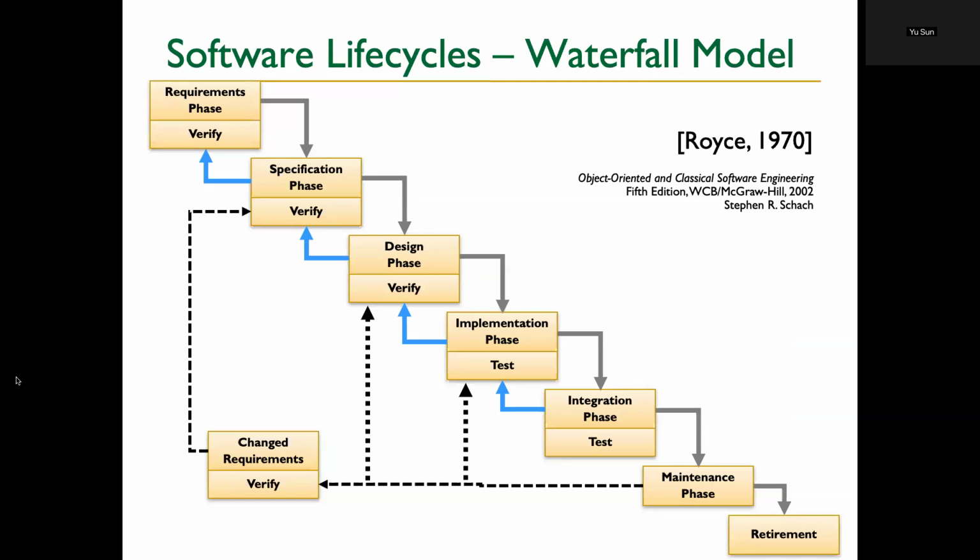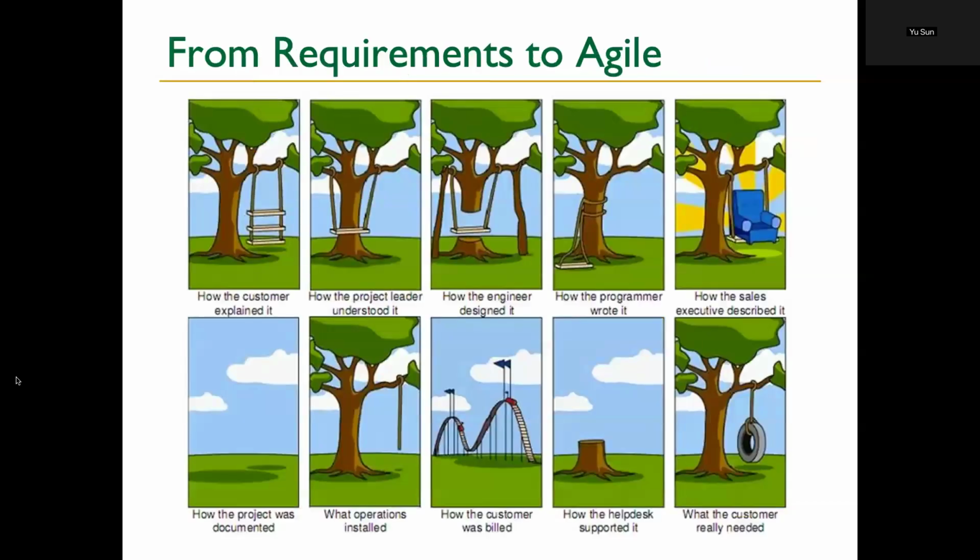But then you might be wondering, okay, how does that happen? Well, this is a 1-year project. How can you get things done in the first month? There's no way you can get this done in the first month. So the only way we can do this is I cut the features. I'm not going to finish everything for you within 1 month. I'm only going to do 10% of the project for you within that month. But I still build it. I don't plan a huge thing. I just plan, you have 20 features, and I'm only going to do 3 features for you for this month only. But at the end of this month, come to check it out. Tell me if this is right or wrong. If it's wrong, that's fine. I'm going to go ahead and fix it quickly.